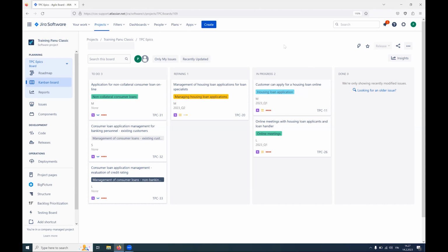When we know that we have tens of items and we know what we can actually implement in a quarter or increment, if we are talking about, let's say, 10 features or 10 Jira epics, then we know better that, okay, when this is the effort, we can actually implement only these, or we can start implementing only these features. So we are not pushing too many items to the development teams.